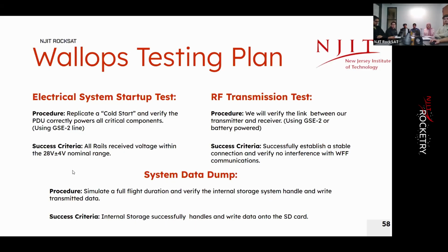For the system data dump, we want to simulate the full flight duration and verify that the internal storage can handle and write transmitted data. We will verify that by removing the SD card and checking to see if any information was transmitted.